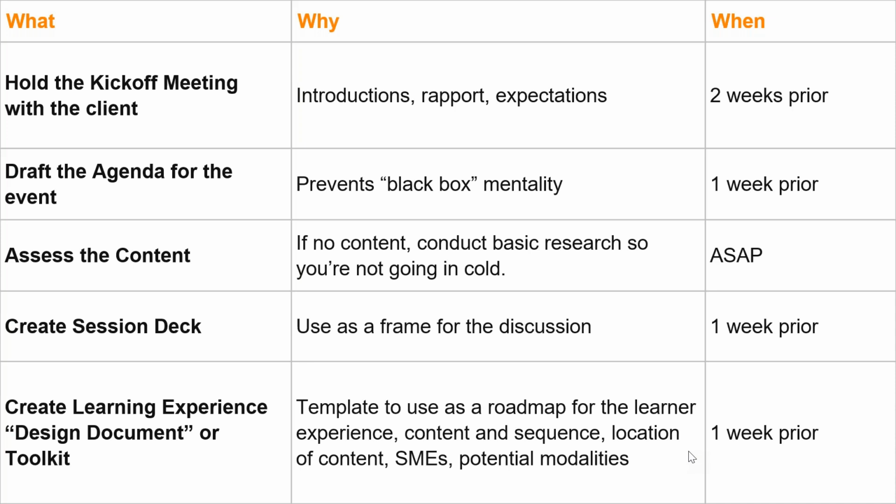We assess their content, of course. Earlier is better. We create that session deck about a week out, and then we create the design document or toolkit. Basically, it's a roadmap that goes through topic by topic how it's delivered today, what source already exists, who my subject matter experts are, and what things we know we're going to need to change in the content that exists today.